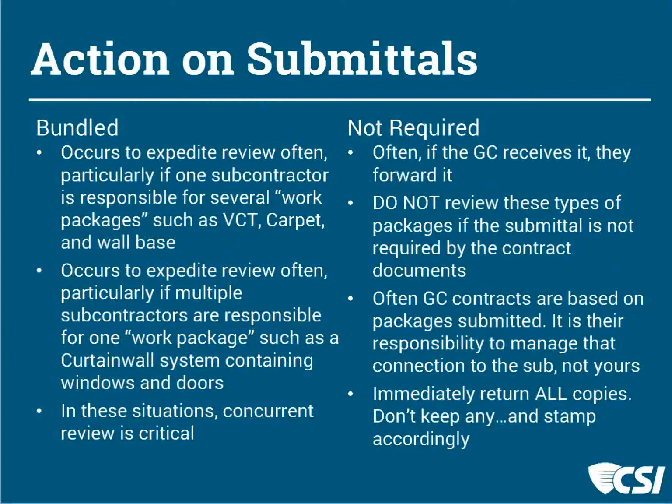If it's not something that I list in my specifications, I do not review it. That's important. If you receive a package and it's not required by your contract documents, you are not obligated to review it. And in fact, I would stamp it, no action taken.